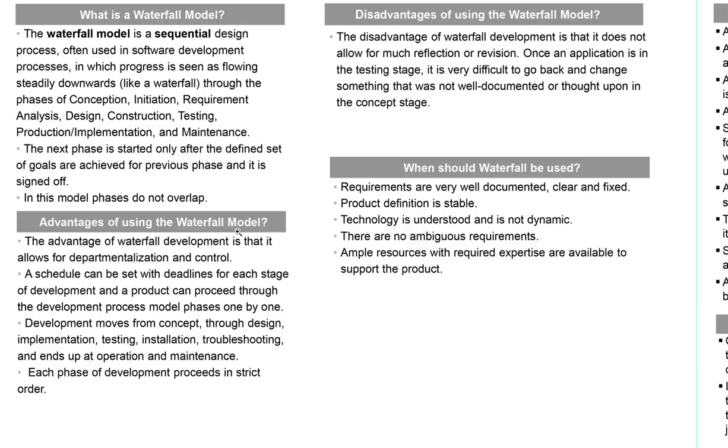Now once the house is constructed, then we go to the next phase of testing, where we test if everything that we built was according to the plan, where everything that we built was according to the specifications that were agreed to. Once the test is done, there is going to be a review, where a person from the city is going to come in and review everything and then give it an approval. Once the approval is received, that's when you hand it over to the customer. That's when the deployment stage comes in.